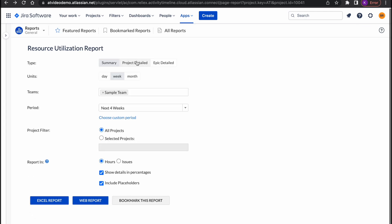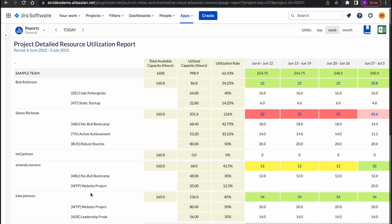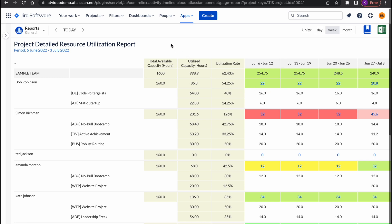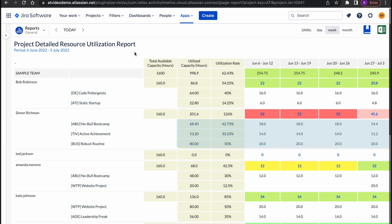As mentioned earlier you can detail this view by project or epic if you would like to know exactly how much time user is planned for each activity. If users are assigned to tasks from different projects you will see exactly how much time of his or her capacity each project occupies.